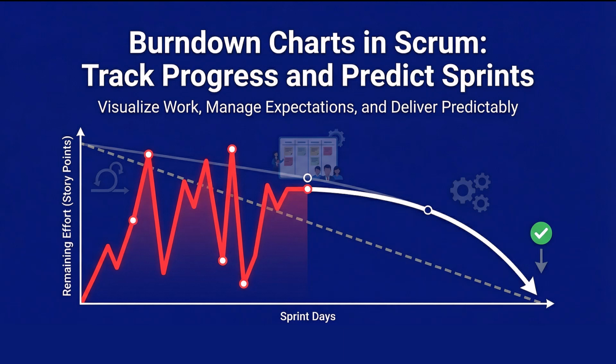Actions taken. Negotiated 2 dedicated legal review hours on days 2, 5, and 8 of each sprint. Split all development tasks into development and legal review subtasks. Implemented a buffer of pre-reviewed work they could pull if reviews were delayed.